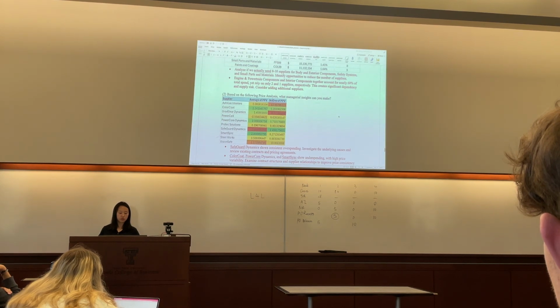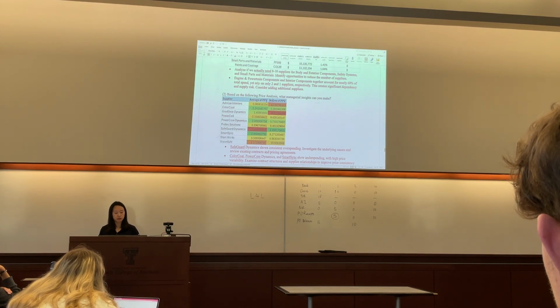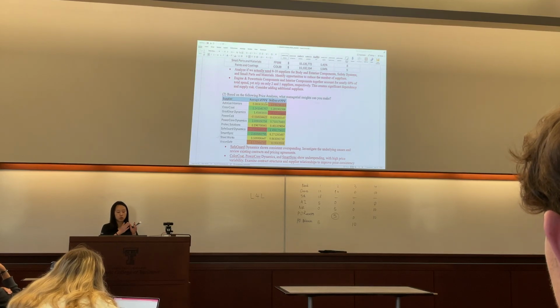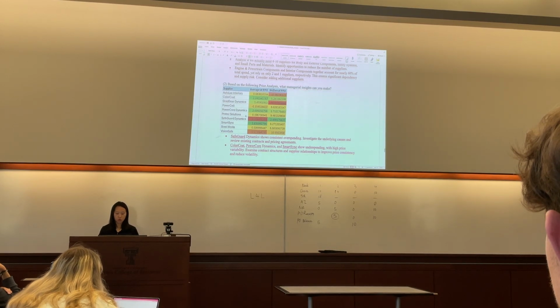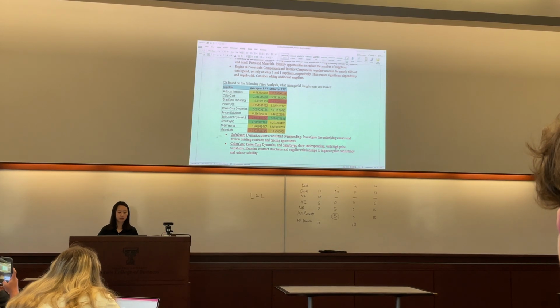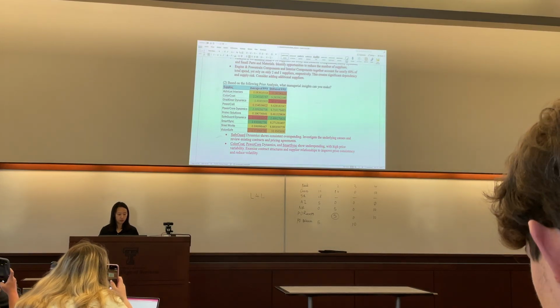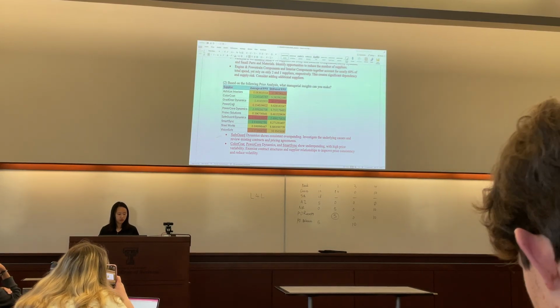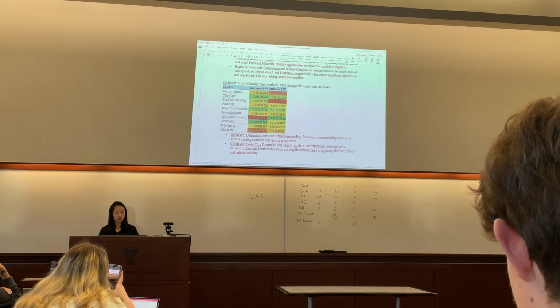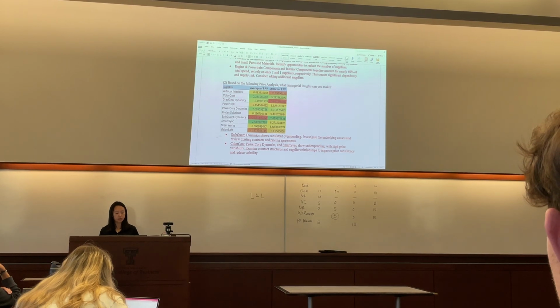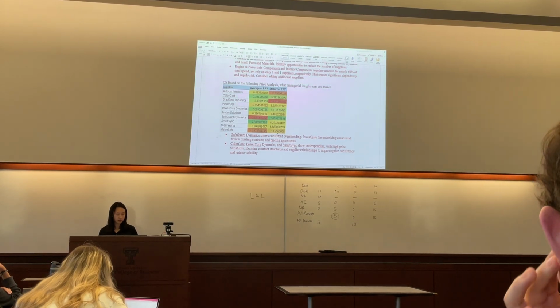And then for the price analysis, PPV equals the planned price minus the actual price. We want to see what managerial insight we can make from this table. Here we have different suppliers. We have the average PPV of the supplier and the standard deviation of the PPV.